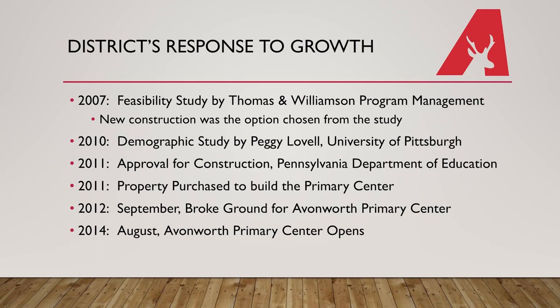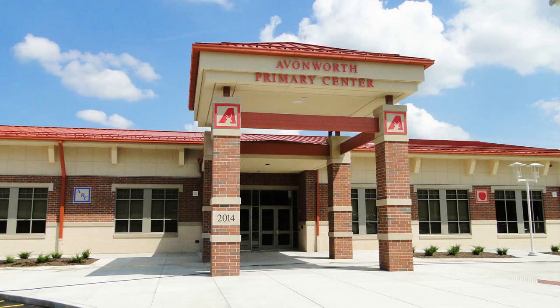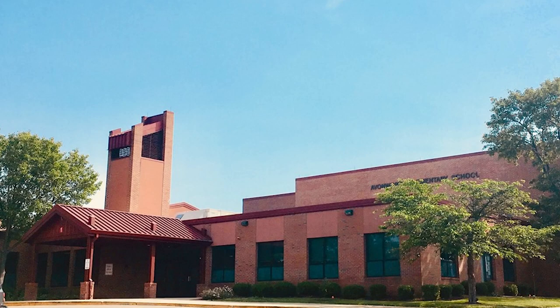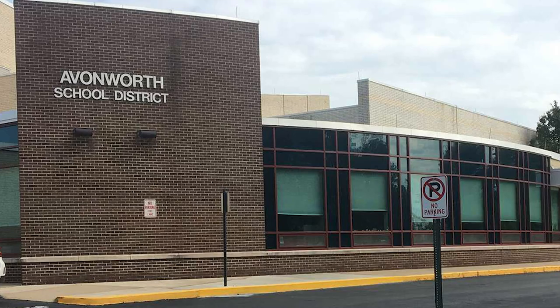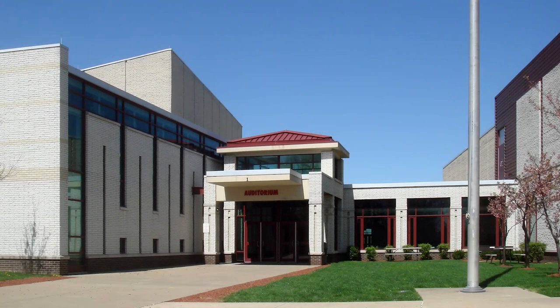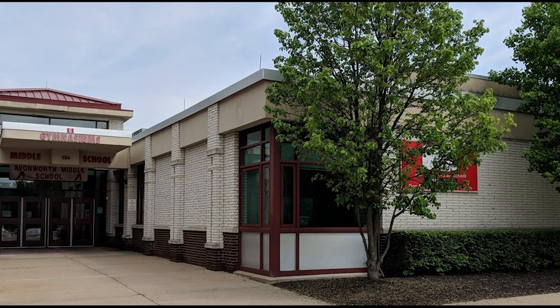With approval granted from the Pennsylvania Department of Education, the district purchased the property where the Avonworth Primary Center is now located. In September of 2012, the district broke ground on construction for the primary center and the building opened in 2014. Prior to building the primary center, grades K-5 were located in our elementary building and grades 6-12 were located at the middle school/high school building. The district's growth and enrollment was beginning to impact capacity at both buildings.